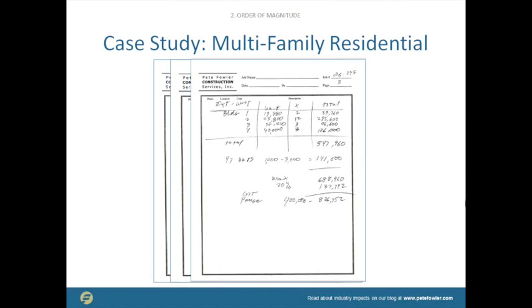And then I threw in another 1,000 to 3,000 bucks per unit for another 140 grand. So I added 20% because I had overestimated these. Usually an estimate's going to have in it a burden. A burden is the cost over the hard cost, and the hard cost, that's guys with hammers and saws and the materials that they install. That's what I call hard cost. Some people put more than that in it. But usually the burden is somewhere between 30 and 50%. That's a rough number. But I just threw 20 on this because I had fattened these numbers so much.